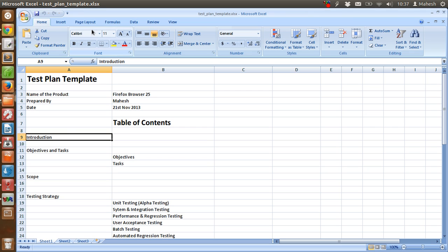the degree of tester independence, test environment, test design technique, the entry and exit criteria, and the rationale for the choice and any task requiring contingency planning. So basically, test plan is a record of test planning process.